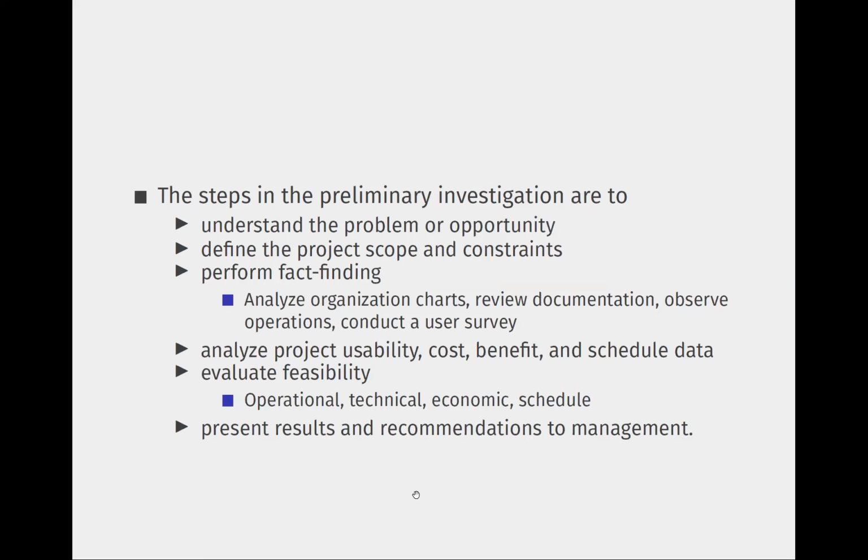Right. Now, let's look at what steps we have. First one, given a problem, you need to understand the problem or the opportunity. Second one, you define the project scope and constraints. Third one, you perform fact finding. So you need to know the particular organization. So look at what the hierarchy is. So you analyze or organize the hierarchy, you review the documentation, observe operations, and conduct a user survey.